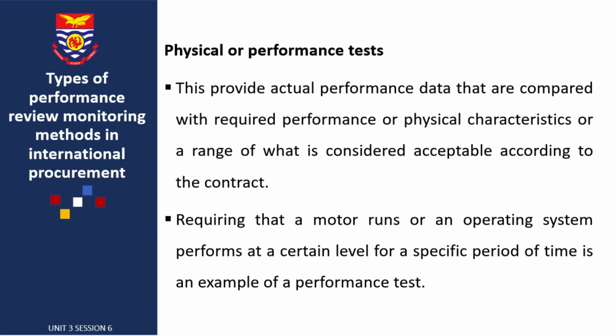Then we come to physical or performance tests. This provides actual performance data that are compared with required performances or physical characteristics, or the range of what is considered acceptable according to the contract. Requiring that a motor runs or an operating system performs at a certain level for a specific period of time is an example of a performance test.